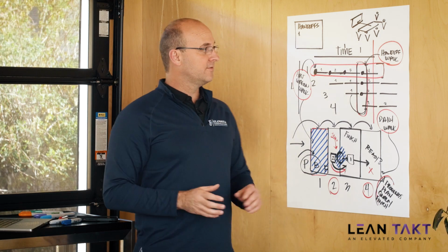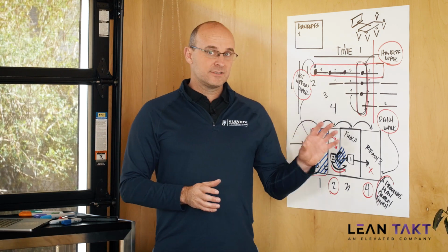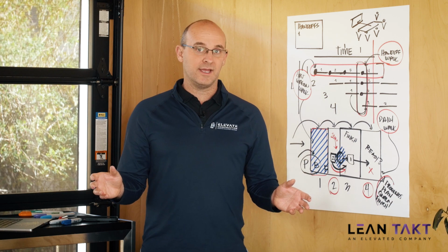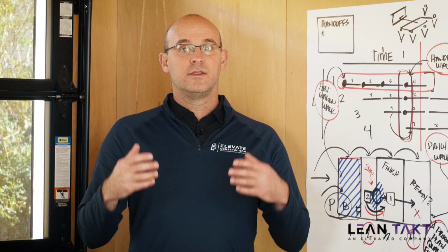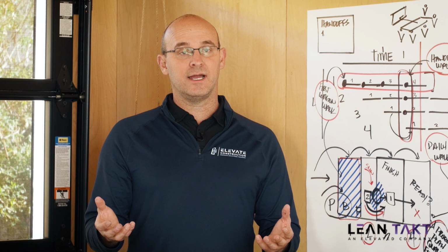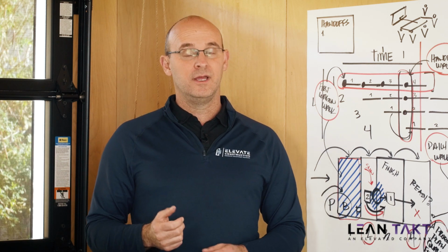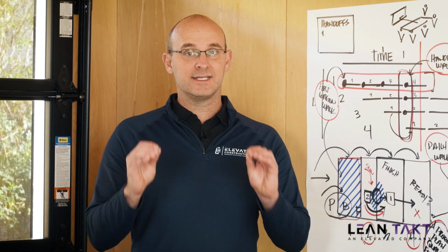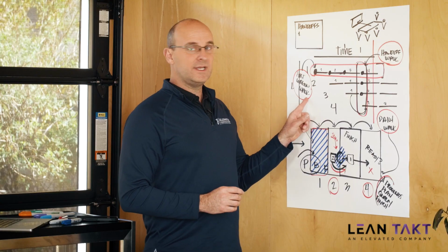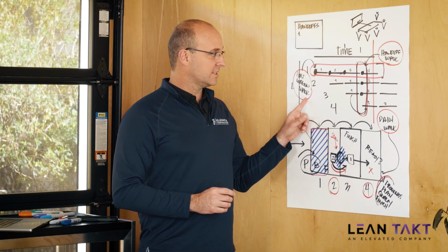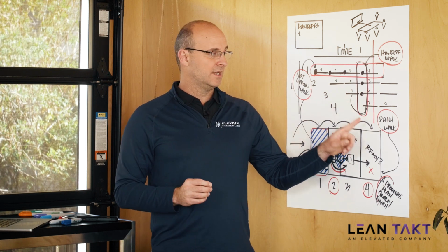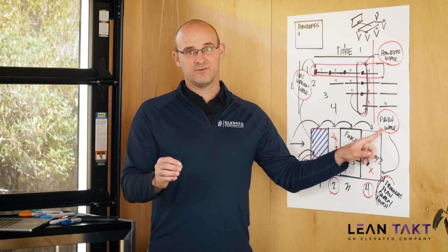So the point of this video is to say, let's not just focus on, hey, I'm going to be up on level 3 area A and I have 5 people. The when something is going to happen is already shown on the TAKT plan, and we probably already know your labor counts. The key considerations are, what do we need to successfully start? What do we need to hand off at the intersections? And what do we need daily to solve problems?